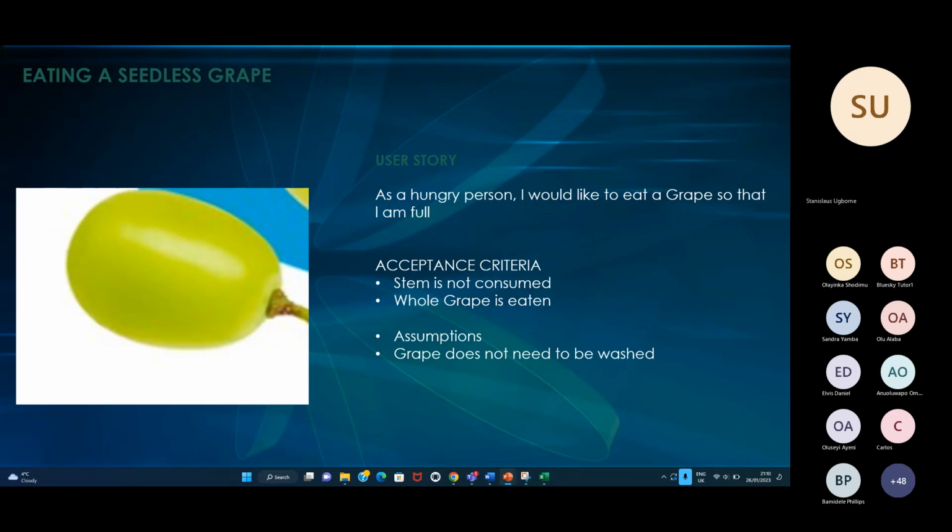Might not be that much. Maybe you might finish 20 story points or 10 story points in the first sprint. And the next sprint, because you gel, you understand the product more, and the developer has got the environment set up and everything is set up, you might be able to say, okay, you completed 3 this time around, or you completed 4. So your velocity might be increasing as the team progresses. And then you look at maybe 4 or 5 sprints, and your velocity has increased.